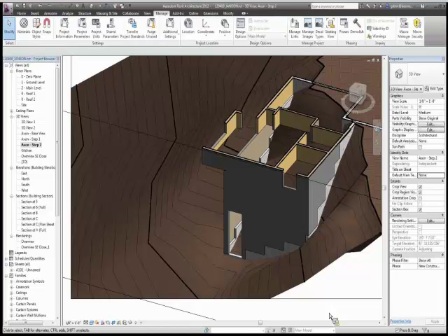One thing we should do in terms of doing this is we should make just a list in Word or in Excel or something like that of the order of operations that we think will actually be followed to build the house, and then just assign the numbers to them so we can have that going into this. So let's go ahead and think about how that might apply.